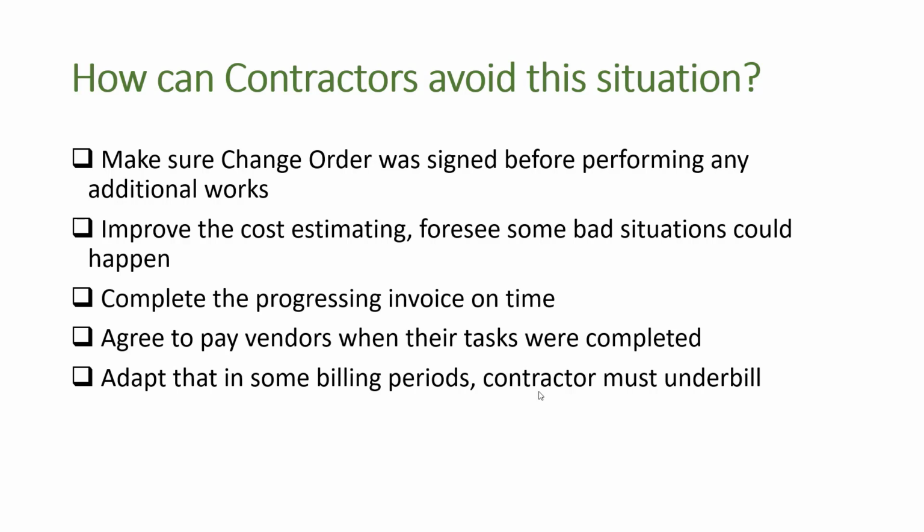In some billing period, the contractor may be underbilled. Like the example earlier, maybe this month we underbill a little bit, but then when we have our next progress invoice, we're going to overbill for the next period. So in construction, there might be some underbilling period for a short period of time, but it shouldn't be repeated all the time, and it could be avoided if we have all this workflow in place.